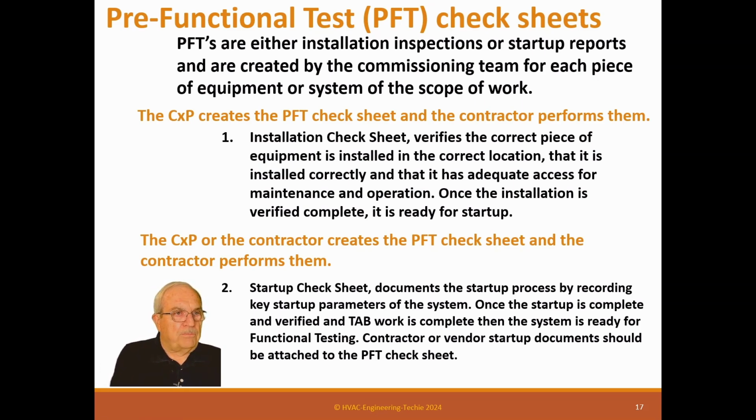So the startup check sheet documents the startup process by recording key startup parameters of the system. Once the startup is complete and verified and TAB work is complete, then the system is ready for functional testing. Contractor or vendor startup documents should be attached to the PFT check sheet. So, startup,